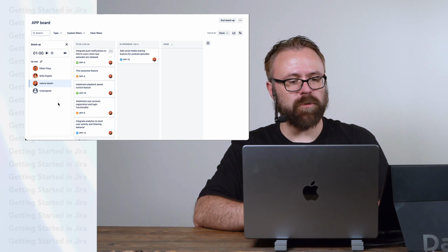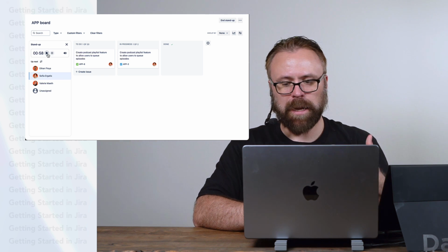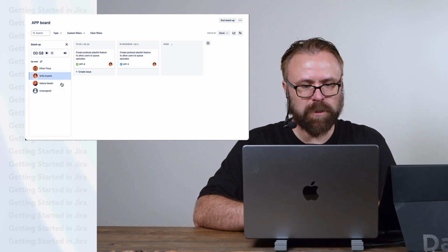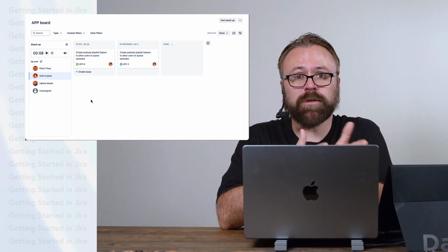There we go. So now we move on to the next person. The timer will automatically start and the process repeats. So in our example here with 3 people on the team, even if we left the timer at the default of 2 minutes, that's a quick 6-minute meeting that'll help provide clarity around what everyone got done the day before, what everyone is doing today, what sort of roadblocks someone is facing to help clear them if possible, or at least to know why something isn't being completed.